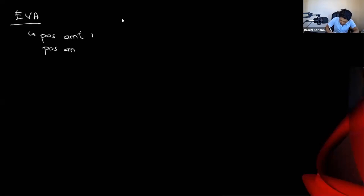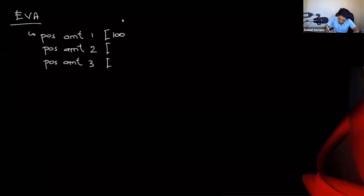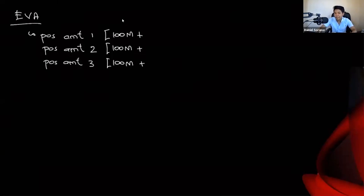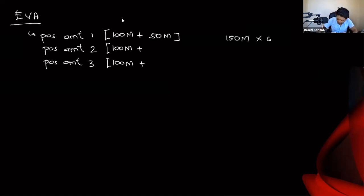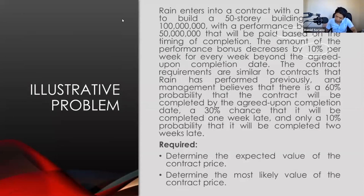We have three possible amounts. The 100 million is fixed — that will be received regardless. What is conditional is the performance bonus. Possible amount one: if the project is completed on the agreed-upon completion date, the full 50 million bonus is received, so the total is 150 million, with a 60% probability.